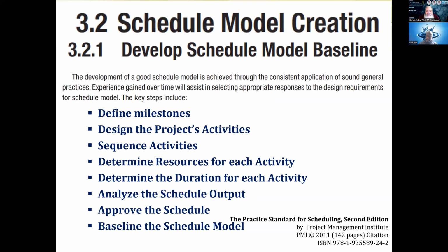As I mentioned earlier, project management software is not very intuitive for that purpose. They treat milestones and activities as the same thing, meaning they are represented in the same manner, but the only difference is milestones are shown with zero duration, right? And activities definitely do have certain duration.